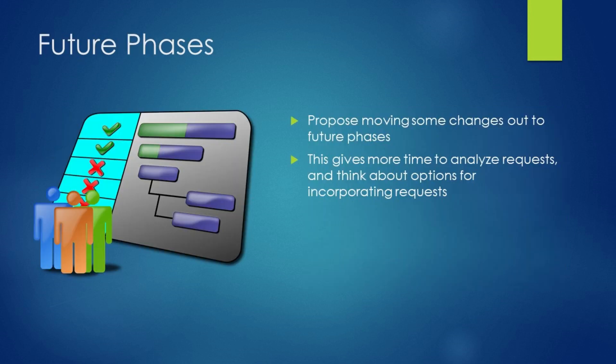Future Phases. Another tactic is to work with the individual looking to expand the scope of a project and see if there's an opportunity to do that work as part of a future phase. This is an especially easy sell if the requester has a lot of work that they would like to see done. Perhaps the biggest benefit of this approach is that it gives you more time to analyze the request appropriately and develop the best plan to execute on adding that functionality.